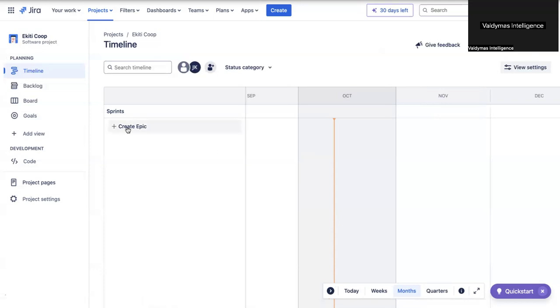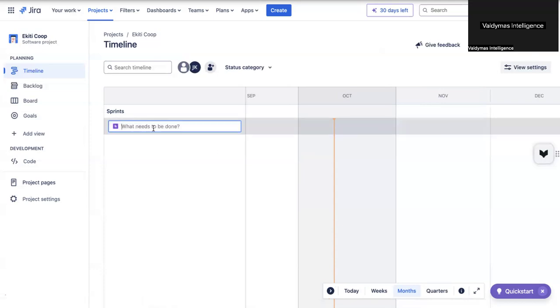So let's say we have 4 things to deliver. You can see I'm already creating an epic. An epic is like, you already have the project vision or the product vision, and you have broken it down into maybe 4 major epics, or sometimes it might just be one epic. Maybe the epic is just integration of your own platform with the banking platform. So you now need the API from the banking end to be exposed so that you can build a solution that will consume the API and give you a display on the user interface screen. That might just be your epic.